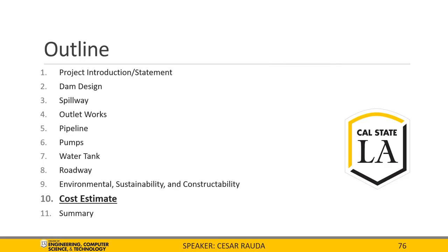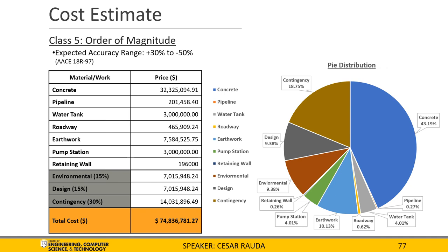Now onto the cost estimate portion of this presentation. For the total costs, we will be conducting a class 5 order of magnitude estimate. According to the AACE, this will list an expected accuracy range of plus 30% to minus 50% of the total value. On the table to the left, we can see a list of all the different aspects taken into consideration for the estimate, including the volume of concrete, the placement of roadway, earthwork for cut and fill, and retaining wall. Along with these, we calculated an additional 50% for environmental and design permits each, and a 30% contingency. After calculating all these different parts, the total estimated cost is approximately $74.8 million. The volume of concrete required for the project takes up a majority of the total estimated cost, with the contingency and earthwork taking up the next most substantial portions.